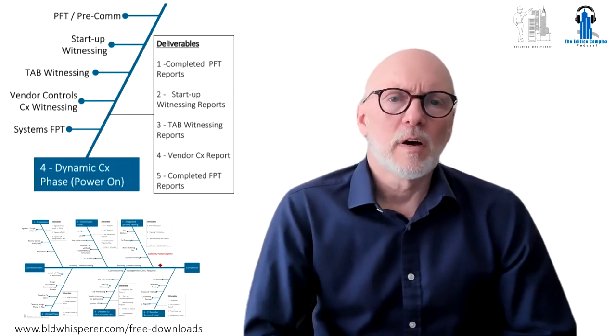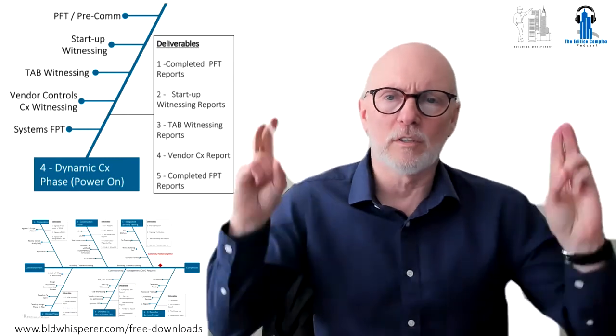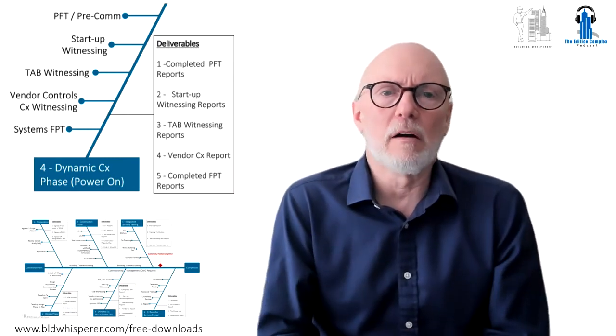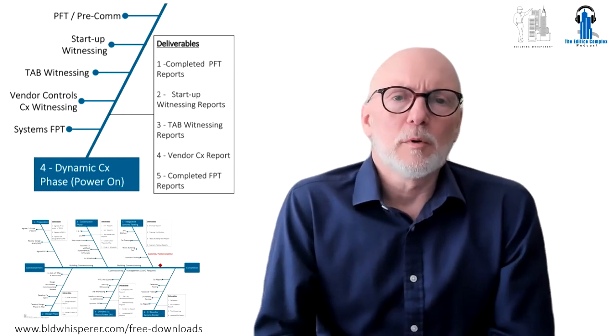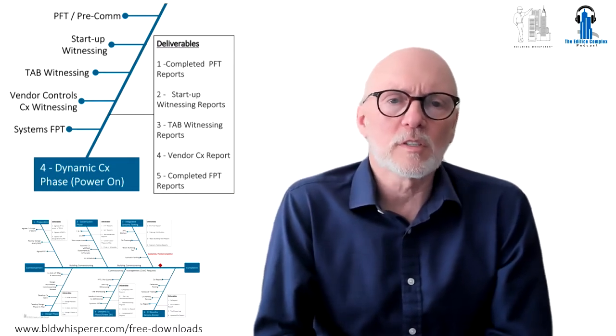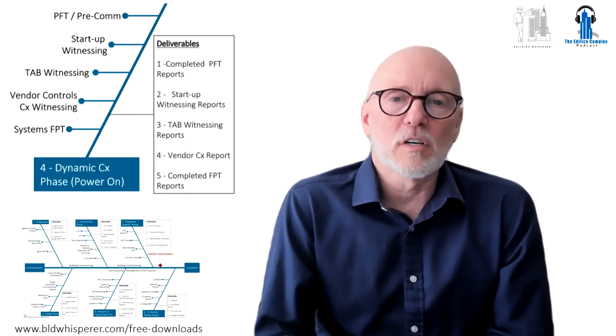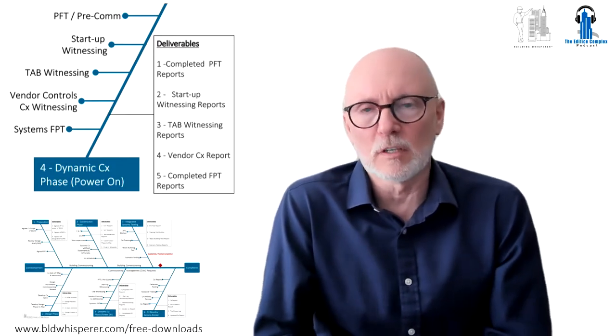This video is about phase 4 building commissioning. That is construction phase or dynamic commissioning following power on. Phase 4 building commissioning is about verifying systems, operation and performance. Construction phase commissioning consists of 5 tasks and it is the minimum effective dose for any project.